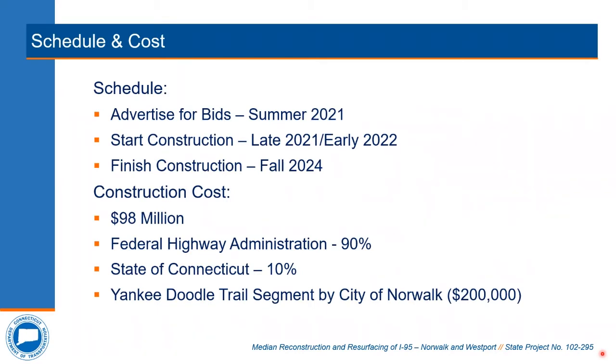The current project schedule anticipates that the project will be advertised and bid this summer, and that construction will begin either late this year or early next year. The overall duration of this project is approximately 3 seasons, so we expect it to conclude by fall of 2024.